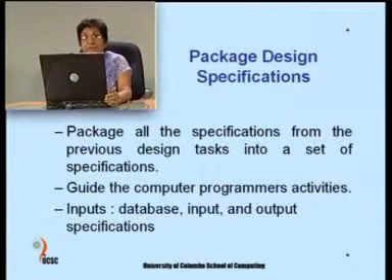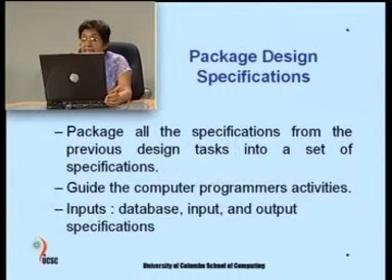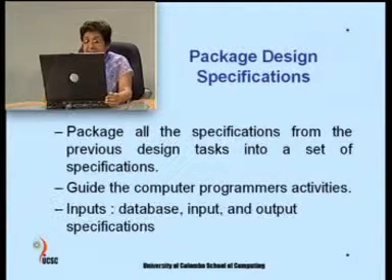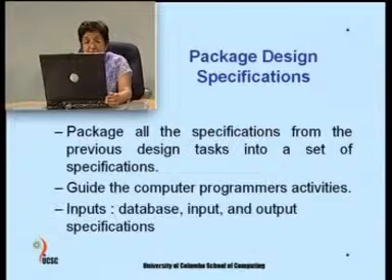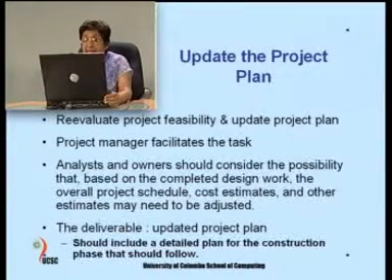Once you have done all this, then you have to package the whole thing. Package all the specifications from the previous design tasks into a set of specifications to guide the computer programmers' activities. If the programs have to be written, then you have to guide the programmers. Input, database, and output specifications have to be given. Then update the project plan. Re-evaluate project feasibility and update project plan. Project manager facilitates this task.